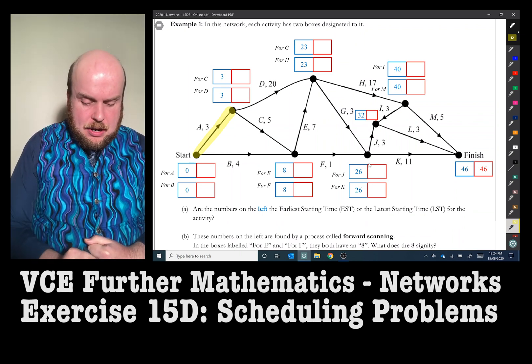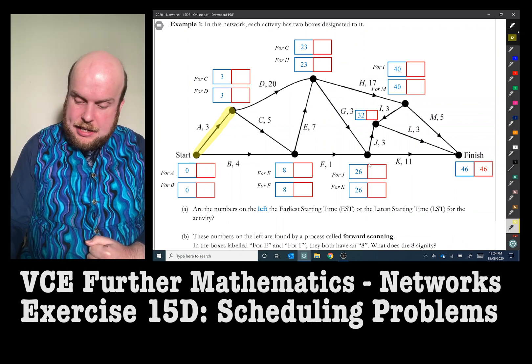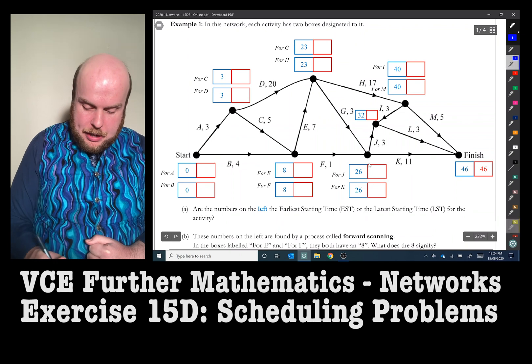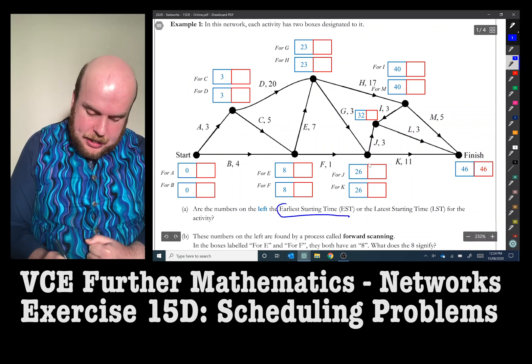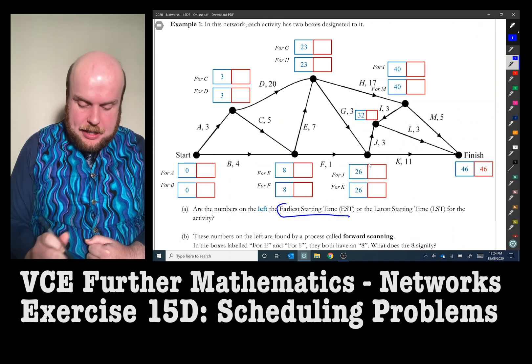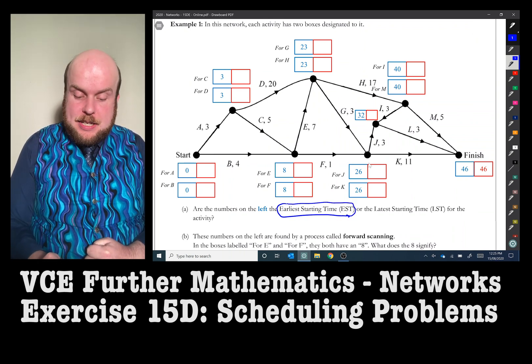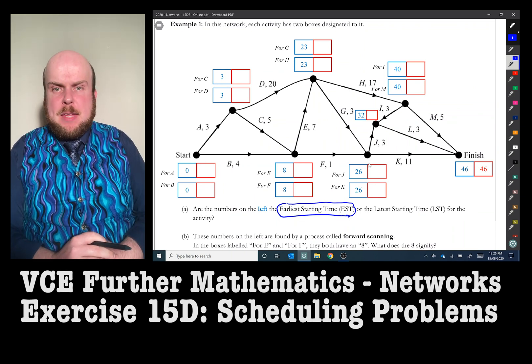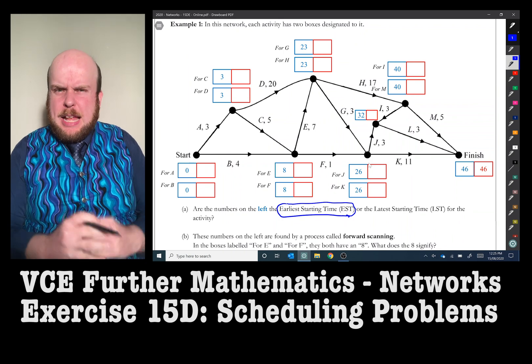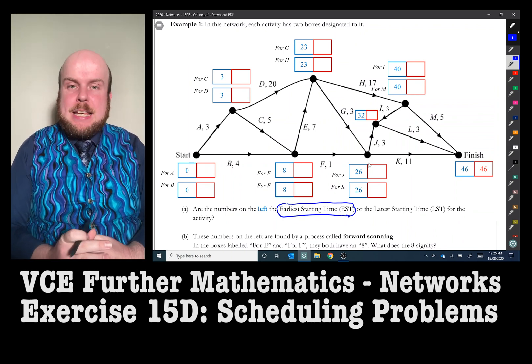And so I would suggest strongly that the numbers on the left or the blue numbers, apologies for my colorblind audience there, will be the earliest starting time. Because it seems to imply, like if I look through D, the earliest starting time seems to do three plus 20 is 23. Might be a little bit more complicated than that, but this is what I think it would mean. So the earliest starting time would be the numbers on the left.